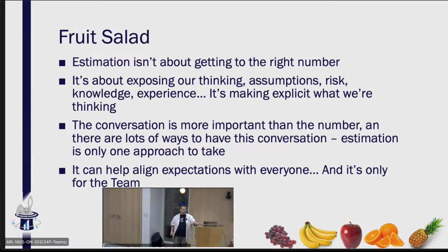And so what the team did is, instead of worrying about estimates, right in the Jira card itself, they started to write down the things they needed to do. Well, we need to update the table. We need to update this database. We need to add this field in. We need to make sure it can hold this many characters. Oh, we need to capture that on the front end. We need to do front end validation to make sure that they're entering it in the right way. It's a phone number, so we need to normalize that. We need to make sure that we strip out all of the spaces and special characters that people put in. We actually want to prevent people from putting in characters that shouldn't be in phone numbers. So let's make sure that, all right, we wrote all of those things out. And I said, cool, let's go on to the next one.